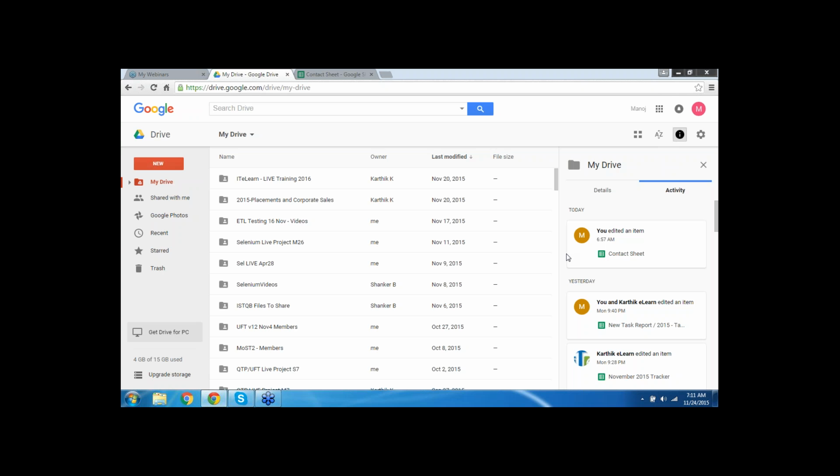You may go to your management and say that, hey, for us to complete this, it is going to be more activity, more work, because we're not able to divide the work equally. And you'll request them to try and see if they can give you more resources. Even if the management gives you more resources, I'm talking about a very real life scenario, for them to come up to speed and be able to really perform, unless they're real superstars, it's going to be very tough.